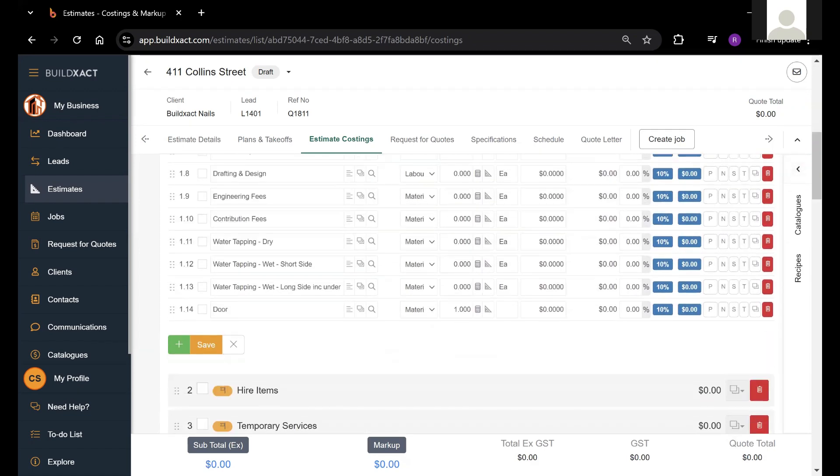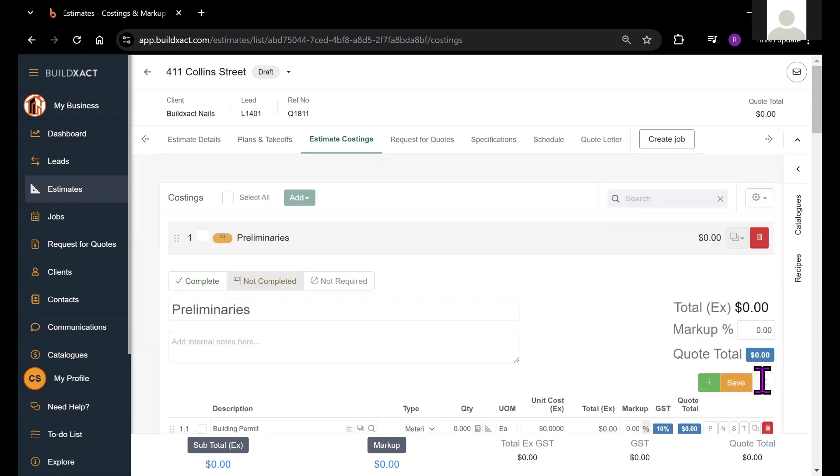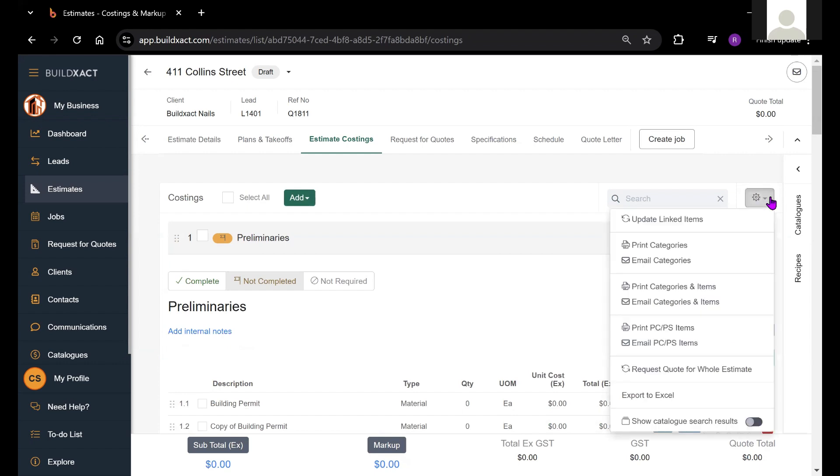The next thing I want to talk about is how to print out the category and items report for a bill of quantities essentially. This is probably not a client facing document, but it's certainly an option for internal use. Basically from the cog up here, I can select print categories and items.